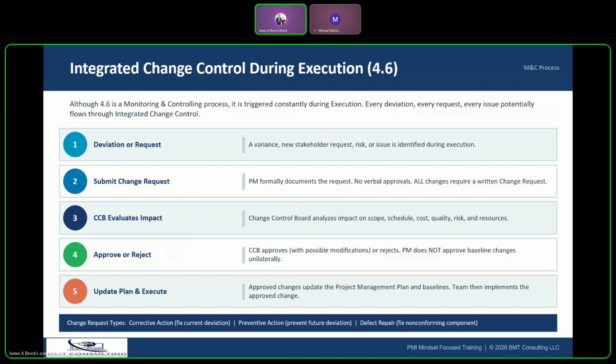right? So you might be changing the quality management plan. You might be changing the risk plan. You're going to be changing a lot, to be honest with you. And for sure, you're going to have to make changes to your scope, schedule, and cost baselines, because that's going to be your new measurement that you have to measure against because you've approved this change, right? And then the last part of that is you've bounced back to planning after that decision is made, right?